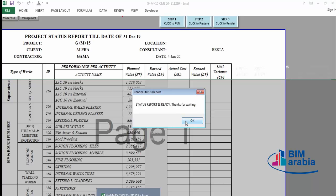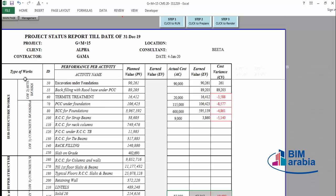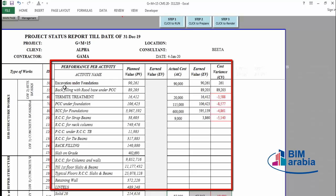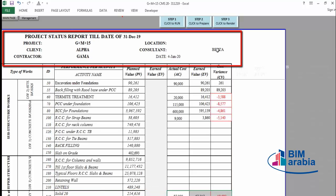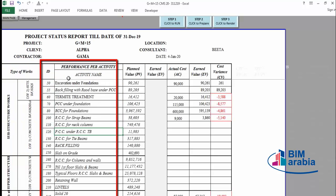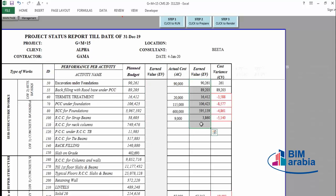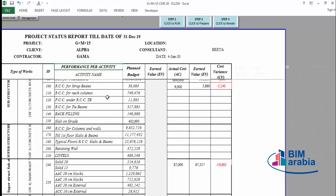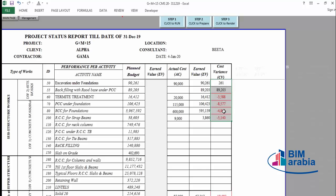The status report is ready. We now have a ready status report giving you the status for each activity and comprehensively for the project. Here is the project description, the reporting month, the WBS and activity description, the planned value for each activity, the actual cost, the earned value for each activity, and the cost variance. We will have two types of performance: per activity and for the project comprehensively. Any red color means the activity is above budget.